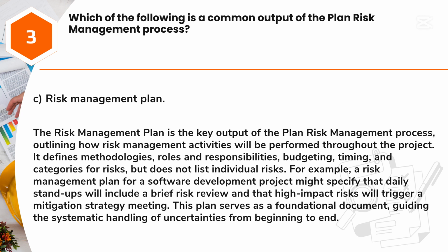Answer: C. Risk management plan. The risk management plan is the key output of the plan risk management process, outlining how risk management activities will be performed throughout the project. It defines methodologies, roles and responsibilities, budgeting, timing, and categories for risks, but does not list individual risks.